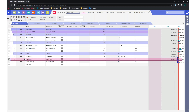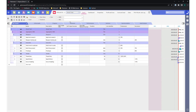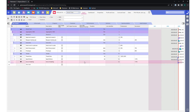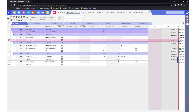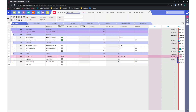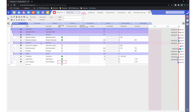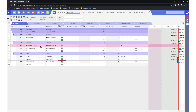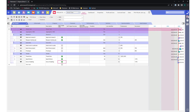To do exactly what we saw in the first use case on the slides: there's a column called SAP Create WBS. With this column, I can say which elements I want transferred to SAP and which not. For example, I want my research phase, and I want my complete tender phase, but I don't care about the execution phase right now. Maybe later I'll want to add the execution phase and transfer it to SAP, but for now I don't want to include it.